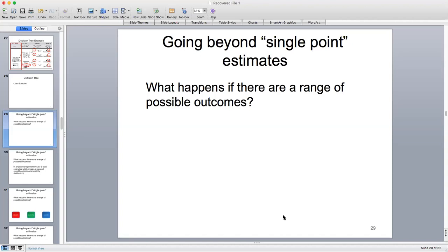And you keep on mapping out the actions and the possible results and the likelihood of those results until you arrive at a net path, which means that you've ended that branch and there's an overall outcome that exists. And then you go back and calculate your values using the EMV formula, probability times impact, and you will arrive at the EMV value that provides the best outcome. So with projects, usually that means the lowest cost. For operations, it usually means the most amount of payoff.